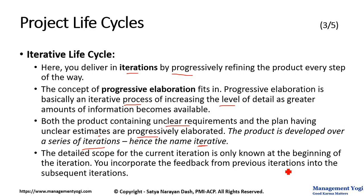The detailed scope for the current iteration is only known at the beginning of the iteration. You incorporate the feedback from previous iterations into the subsequent iterations — this is very significant. You know the scope of the current iteration in detail at the beginning of the iteration, and as you complete one iteration, you go to the next iteration. By that time, more clarity would have come in. Again, for the next iteration, the detailed scope will be known at the beginning of that iteration.